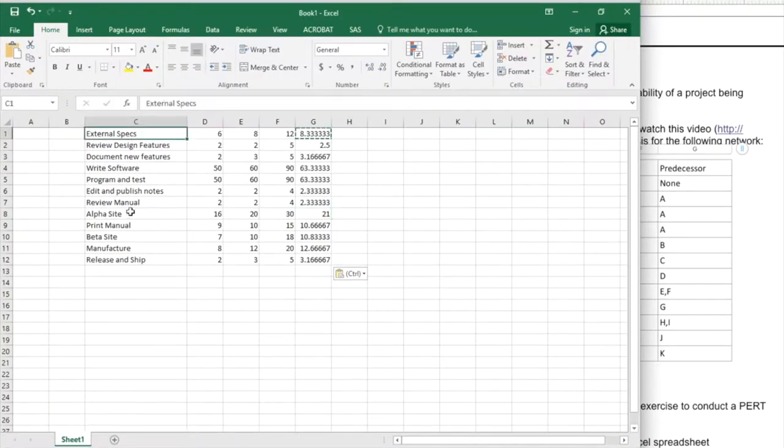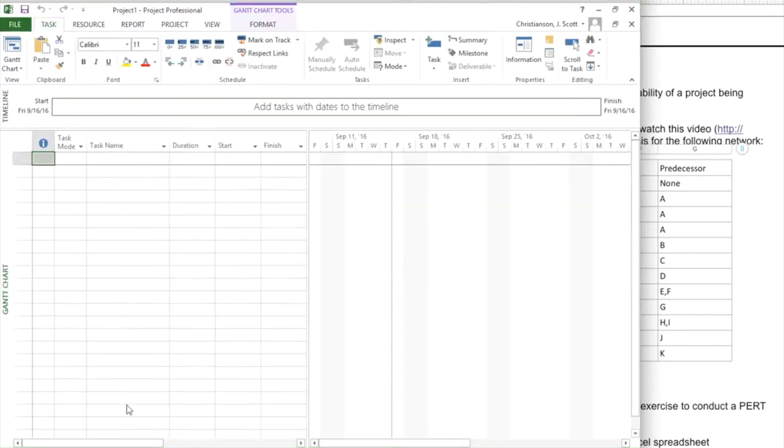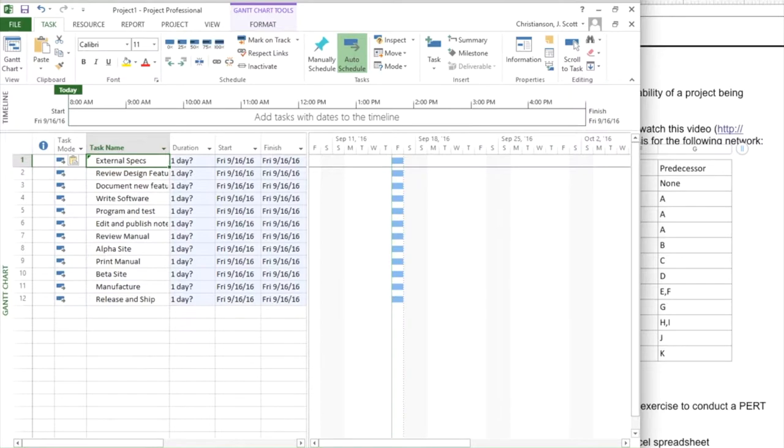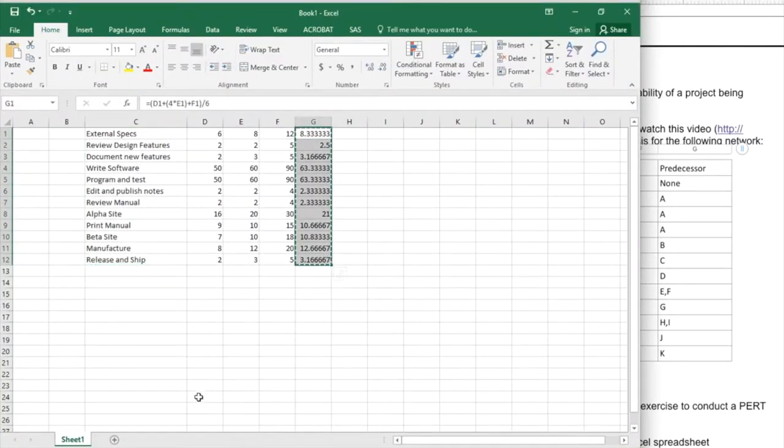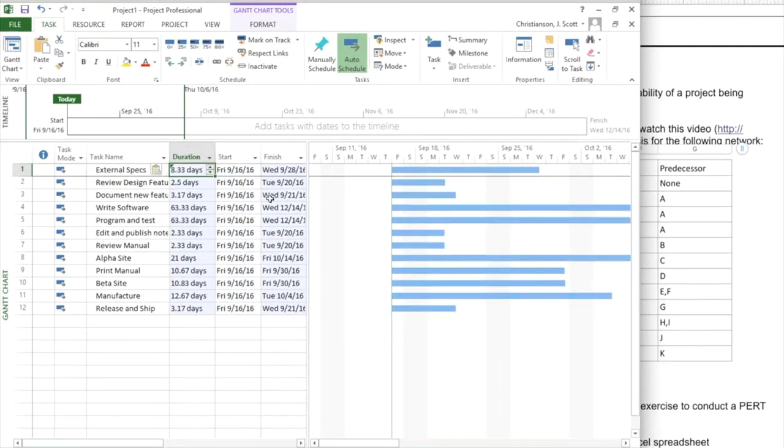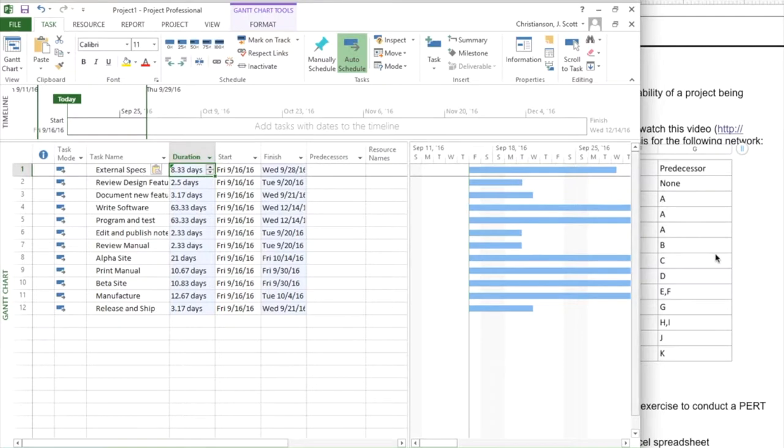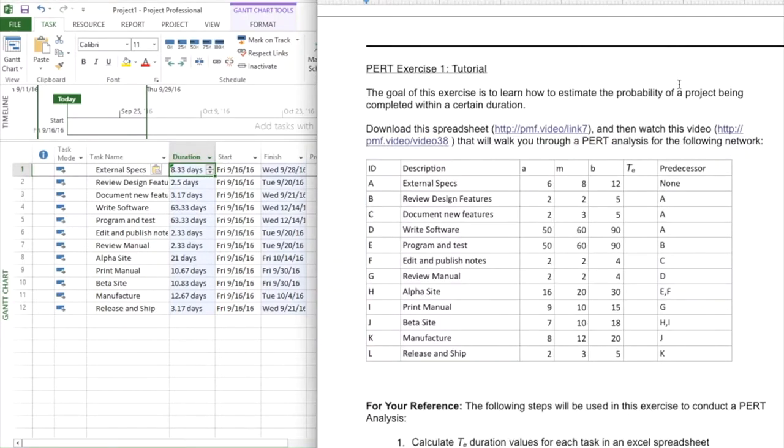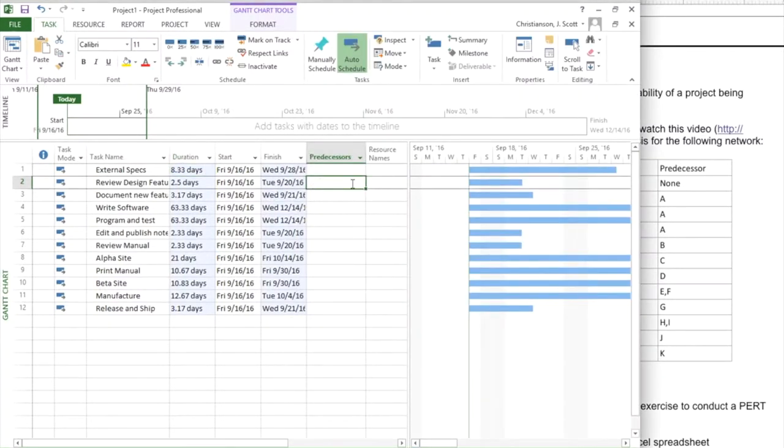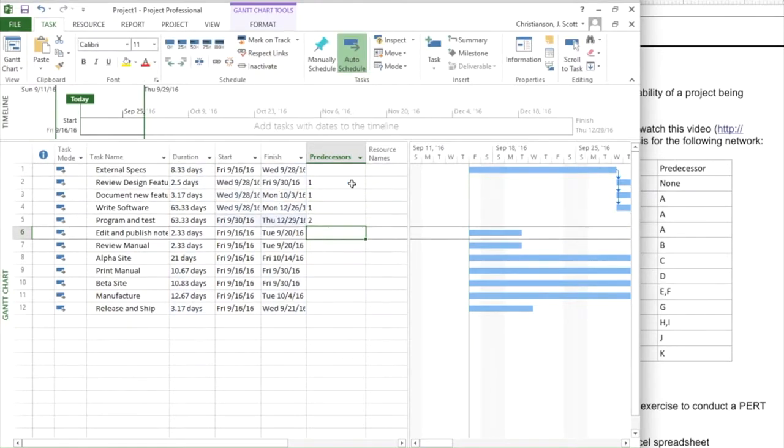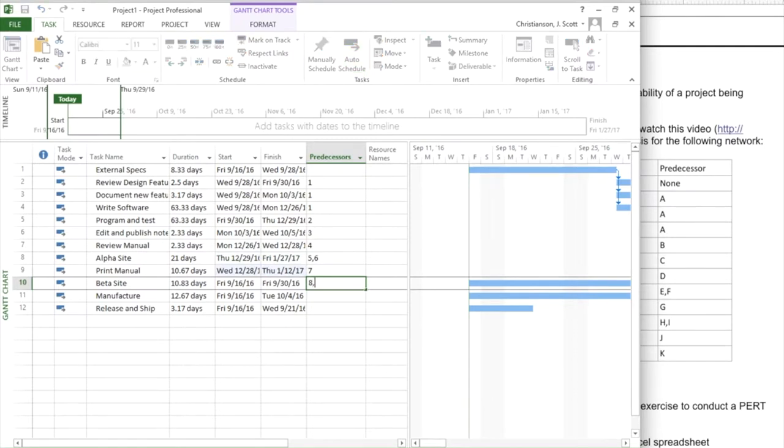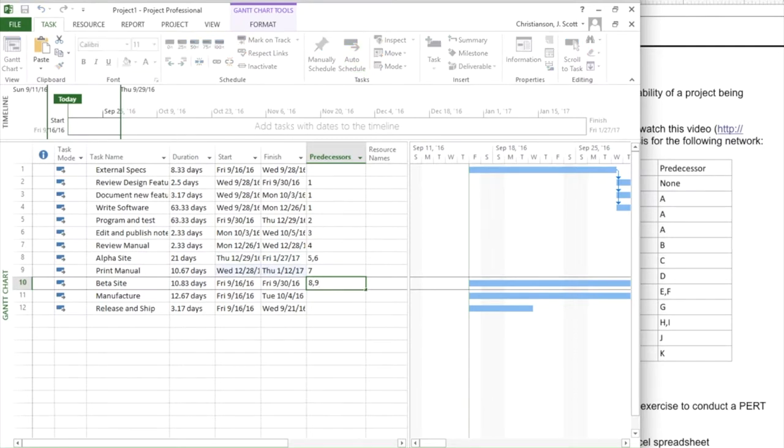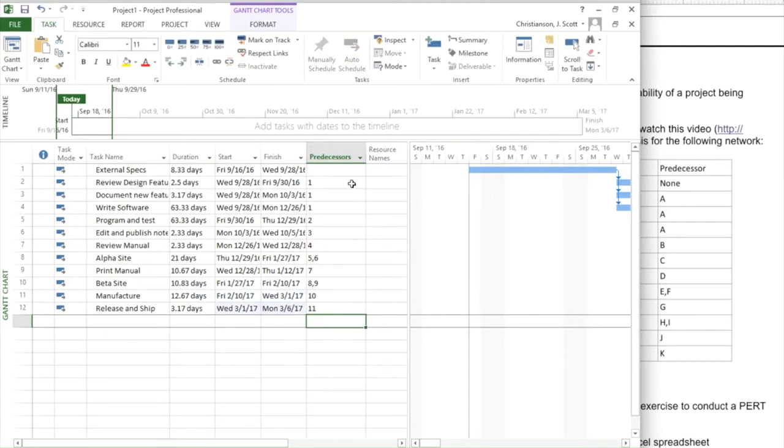And I'm going to take all of these particular items, paste them in for my task names, and then I'm going to take these TE values and paste them in as well for my durations. Now you could round these up or down if you would like. That's not a problem. We would have just slightly different values, but we're going to be really close. Now the example in the student workbook gives you predecessor information using letters and not numbers that Microsoft Project is going to require, but I can quickly translate those and build up my network.